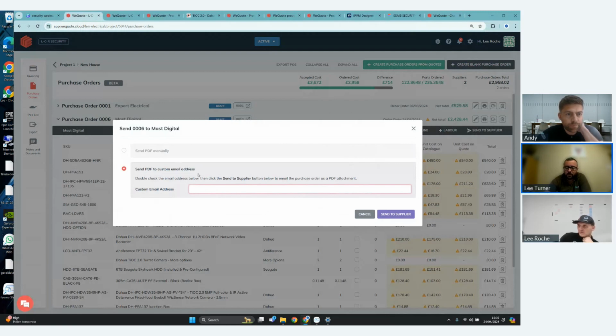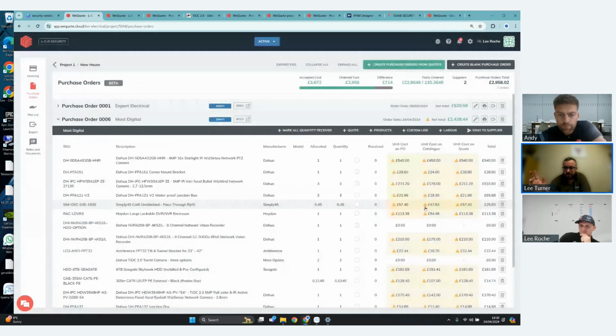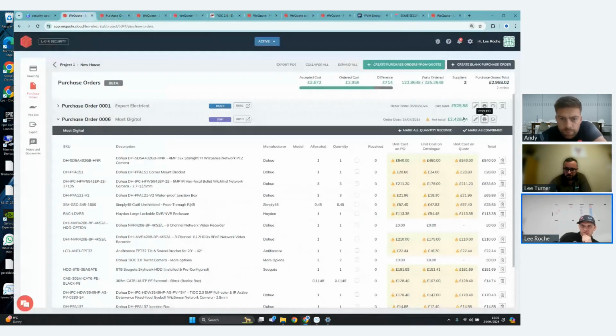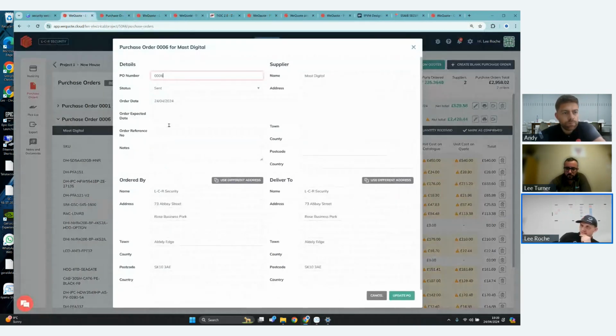And this is one thing that I found really handy, is that if you are using other suppliers for electrical parts, for consumables and stuff, you can just send that purchase order straight out from WeQuote as soon as it's been accepted by the client. Previously, you would have to go back in, find all the items that client wanted to order, go and find them all online again, add them to your basket, etc., etc. Whereas this, as soon as that client signs, click the button, off it's gone. Print out the POs, and obviously you can set who's ordered by, where it's being delivered to, all the basic stuff that you need when you come into a purchase order.